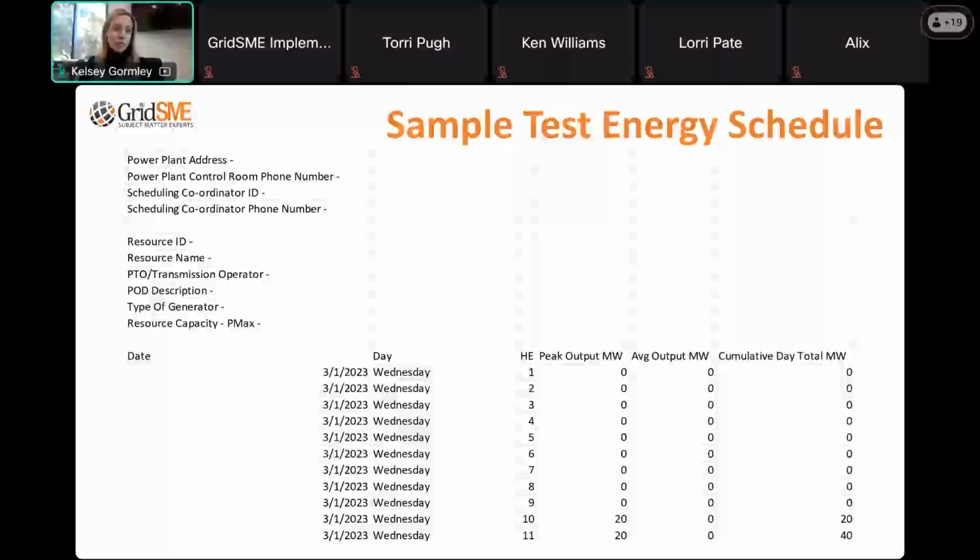Well, it means if you're commissioning a project and your schedule requires that you are in the test energy phase during the hottest months of the year, you need to be prepared to schedule your commissioning team on alternate work schedules. What does that mean? It means working outside of peak hours. It means making sure that you can potentially do night work in order to mitigate that.